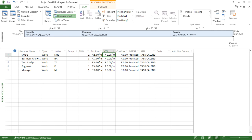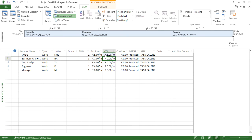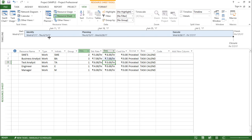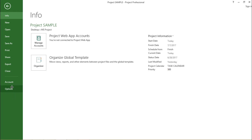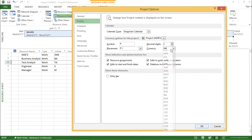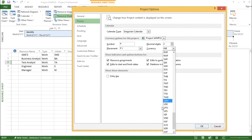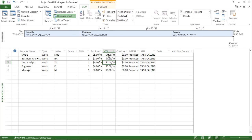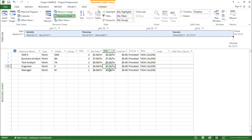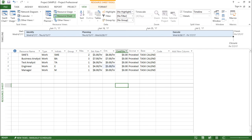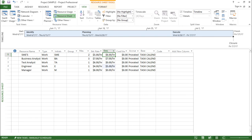Moving on, the next column is overtime. If a particular resource is working overtime, you can define the costing for that. For SMEs, the overtime rate moves from $5 to $6, and for others you can set it accordingly — for example $7. Let me switch back to dollars by going to Options, Display, and setting the currency back to USD. So the overtime rates are $6 and $7 per hour, and you can define them for the rest as well.